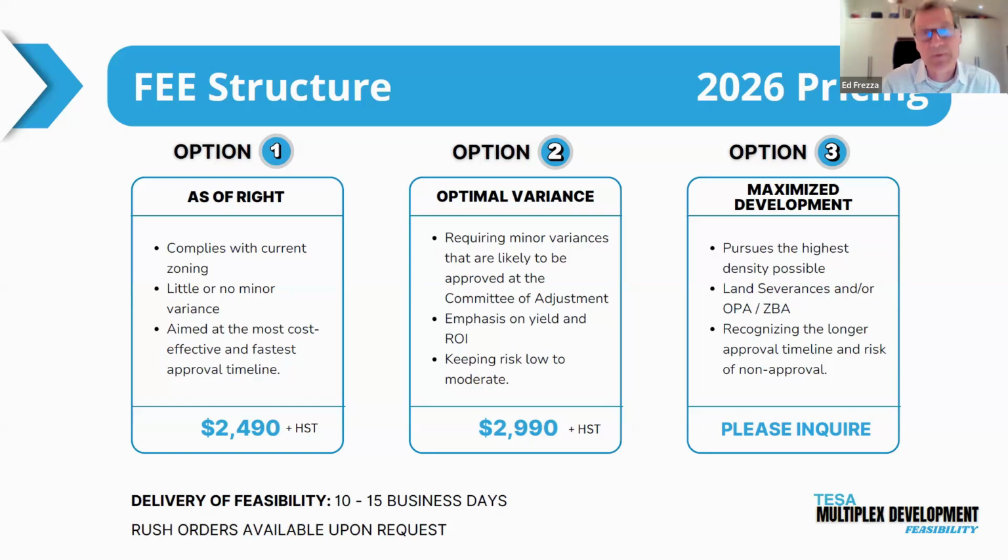Well, speed to market is key, because if you can get it completed as quickly as possible, you're going to minimize your carrying costs, etc., and you're also minimizing your risk. Who knows what a year, 2 years from now will bring, right? So if you can finish this in 2 years as opposed to 3 or 4 years, because you're mired with the city in long committee of adjustments, etc., you can see why a lot of our clients who are first timers opt to go for option number 1.